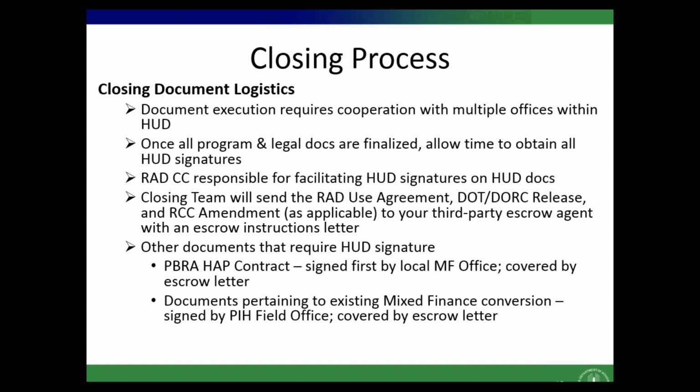On this slide, I want to highlight again the logistics. Although we're all used to now pushing a button and having documents move back and forth, as I just said a moment ago, this is a real estate transaction and there are closing documents that you will need to be getting in a physical form. And the people at HUD who sign these are not always accessible to us because they have other things on their calendar. So I really, again, urge you to always keep in mind that even once we all agree on everything and all the documents have been acceptable to all parties, you should really plan for at least a week and maybe 2 to actually get to your closing.